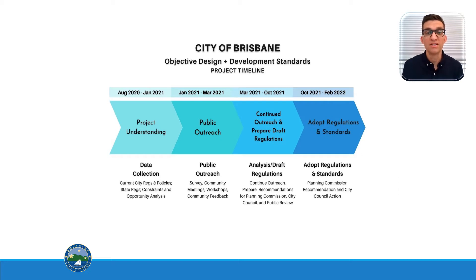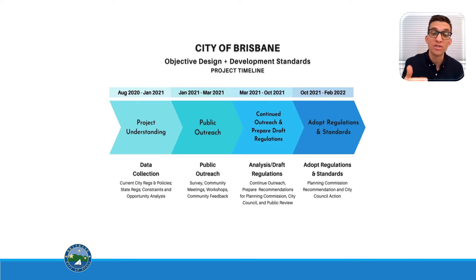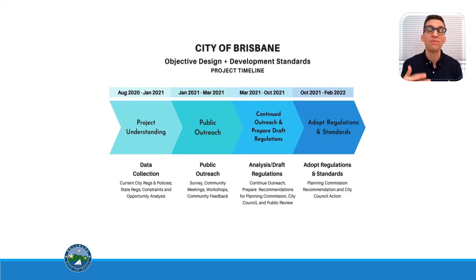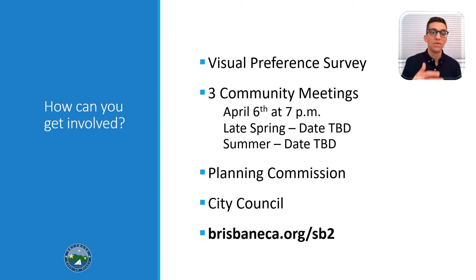In terms of the objective design and development standards project timeline, as you can see, we're already through phase one and into the tail end of phase two right now. We've had a planning commission meeting, and April 6, 2021 is going to be the first community meeting. Because of the pandemic and COVID, it's going to be virtual. There are a total of three community meetings, and we're hopeful that later in the summer at least one could be in person. We're then going to go into the adoption process later this year, aiming to wrap it up in February of 2022.